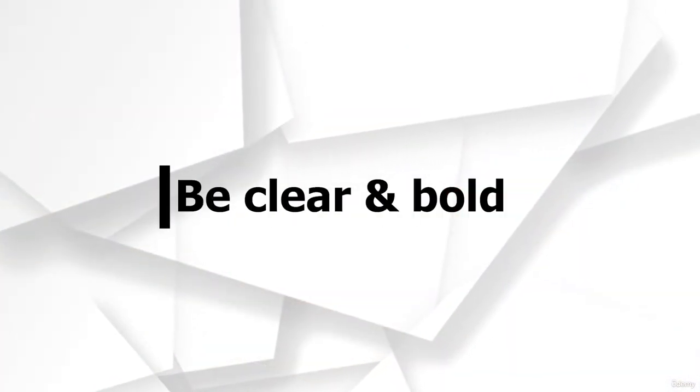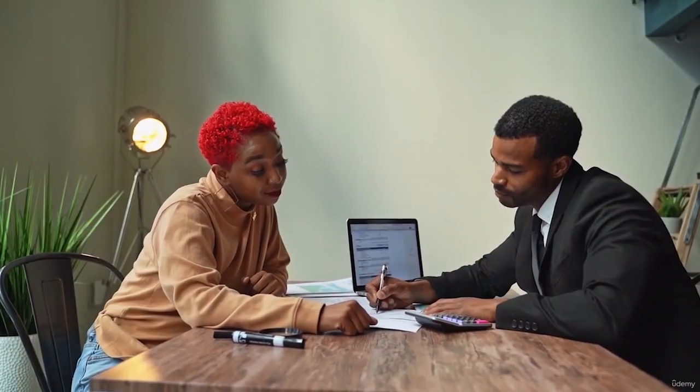So when this happens, you should be clear about that. If a client comes to you asking for something that you did not count in your planning or in your statement of work, you should tell them clearly that this is out of scope and this has an impact on the project schedule and the project budget. So the first thing is to be clear about that, to be transparent about that.